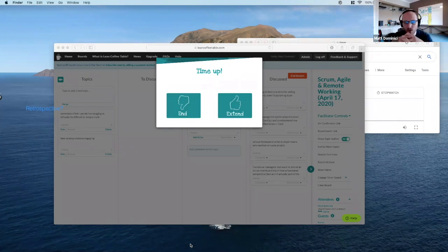And it may feel weird, and some people may feel like they're idle or they don't actually have anything to do. But if you say, here's one thing, let's all focus, or at least some group of the team, let's all focus on just getting this one thing to done as quickly as we can. So for a second, let's forget about sprints and let's forget about Scrum, but let's get this one thing to done. It'll force people to start thinking about doing work that maybe they're not always doing.